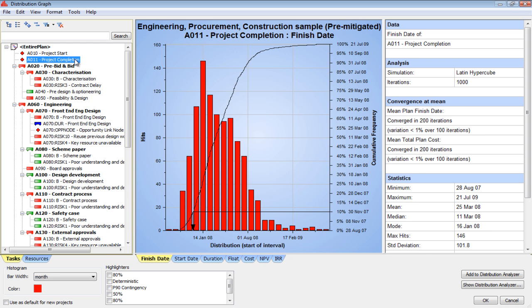So if you scenario model well, you can say, hey, I can save you 150 days, but we really need to put about $1.5 million towards A, B, and C. We can't bring things back in line unless we get a second crew here, we start working weekends, and then we use a different contractor for the flooring. It's a scenario. Why am I going to give you the money? Why are we going to do these steps? Because I'm going to save you.